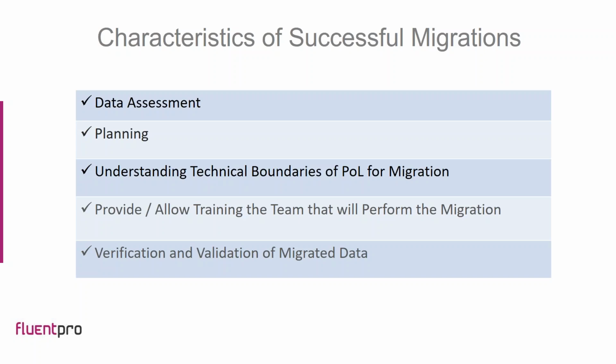Careful planning and understanding what will be the duration of your migration and setting expectations, because migration is not something that can be done over the weekend, and the duration of the migration is always different for different environments and really depends on the volume and complexity of the data. It is important to understand technical boundaries of Project Online in terms of migration. What amount of data can be migrated to Project Online, and what would be the speed of migration.